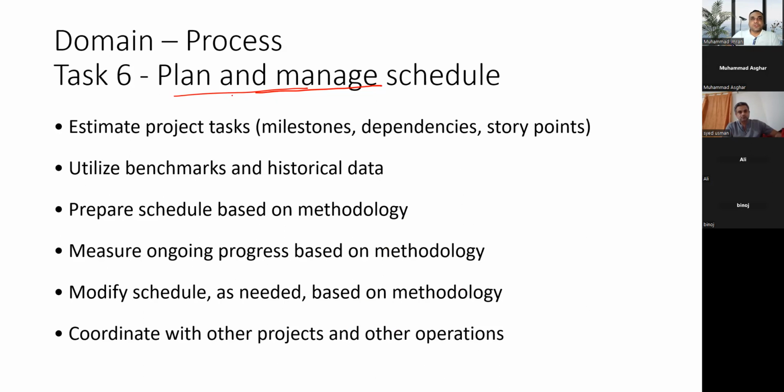And while defining, you need to understand leads and lags. What is lead? Starting or advancing the successor activity earlier than its planned time, relative to the predecessor. Or lag is called mandatory waiting time.